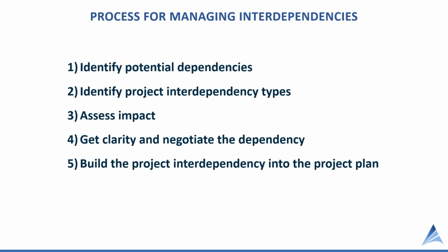There needs to be a first step to identifying the dependencies. After that, you may incorporate into your work intake or stage gate process a step for identifying potential dependencies with other active projects, or doing some analysis by the PMO or the portfolio team to identify potential dependencies.